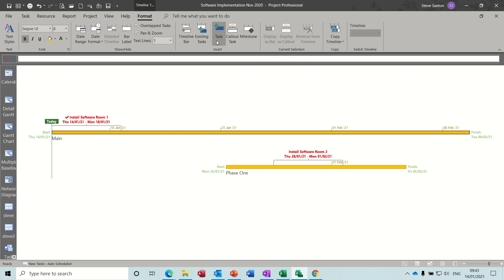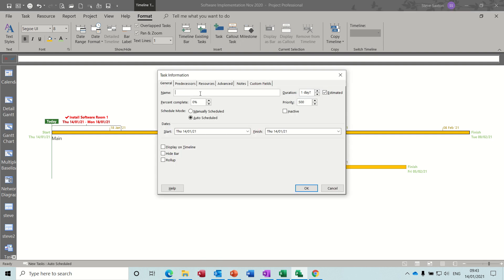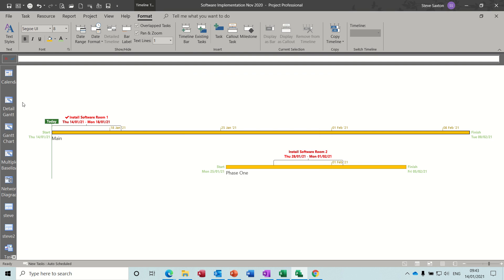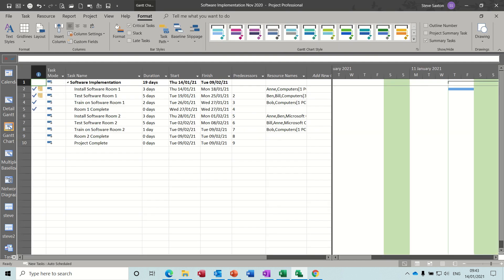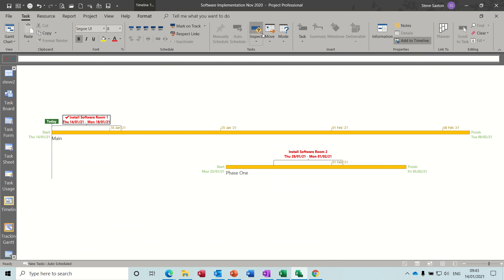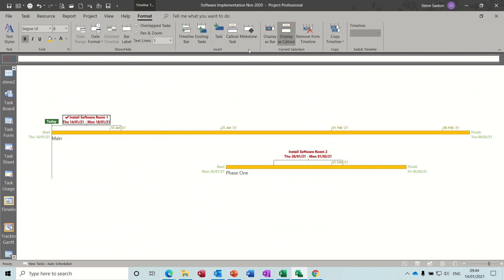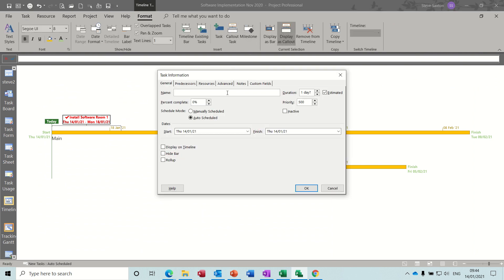If you insert one of these task buttons, you are actually creating a new task. This is what you'd use to create a new task on the Gantt chart, so don't do that unless you're starting from scratch and just populating a timeline. If I go back to the Gantt chart, that would have created a task there, so be careful. Actually, I'll demonstrate — I'll create a task and just call it 'Test'.